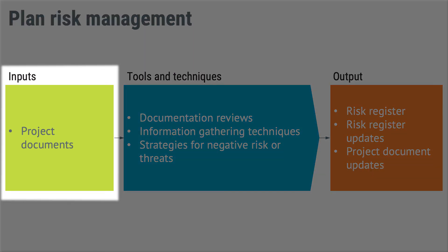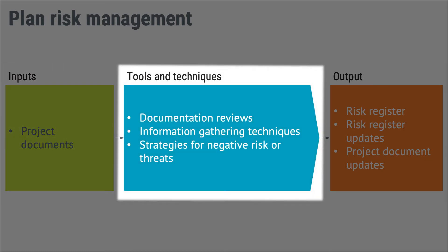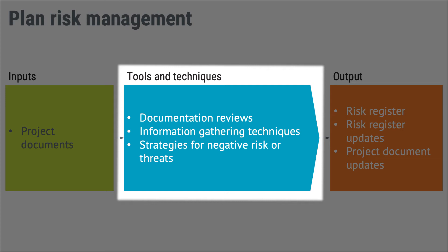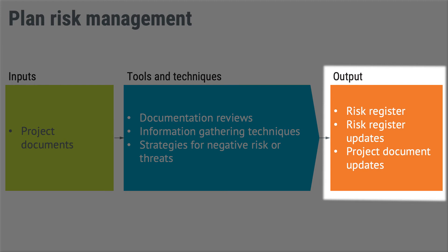When working with the process of identifying risks, you might start with your project documents or the inherent knowledge you have of the project. You could use information gathering techniques to identify the risks, and when it comes to responses, you would apply strategies for negative risks or threats. To be honest, these tools are a bit academic — most of the time you'd be doing this through brainstorming sessions or someone sitting down and going through the list. The output will be the risk register or risk list, updated each time you apply the process. When you implement risk responses, those should be documented in your project documents, giving you project document updates.